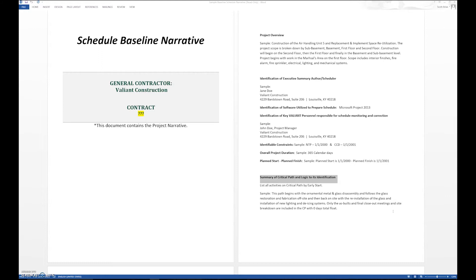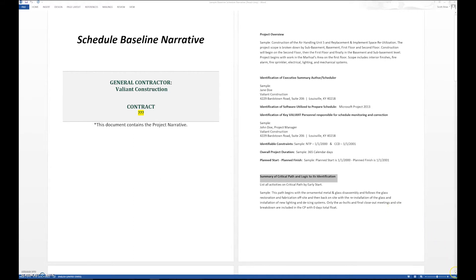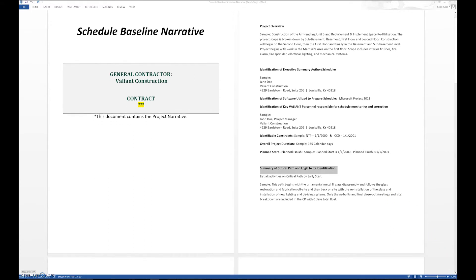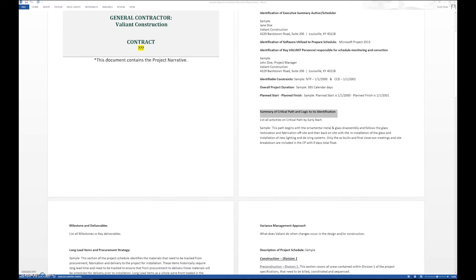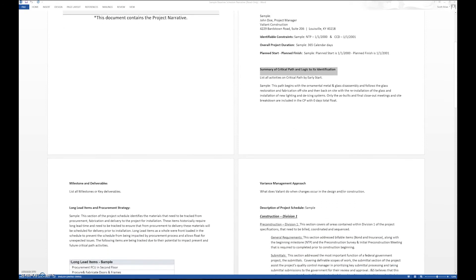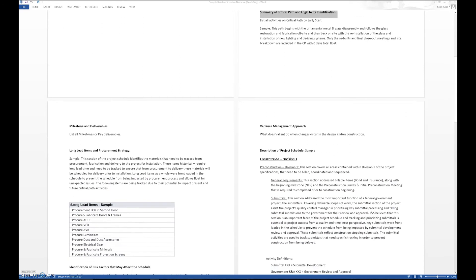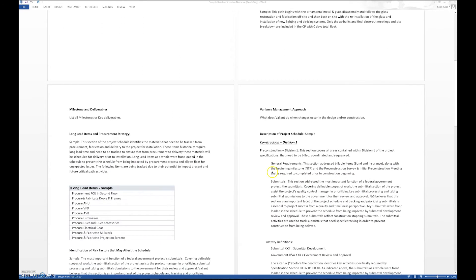You can look at a schedule, but sometimes not everybody has enough knowledge to read a schedule. So we want to be able to, in a narrative format, identify the critical path or the near critical path and what activities fall along with that. Milestones and deliveries: a milestone is an activity with zero duration and any deliveries you may have, any key deliverables that may occur.